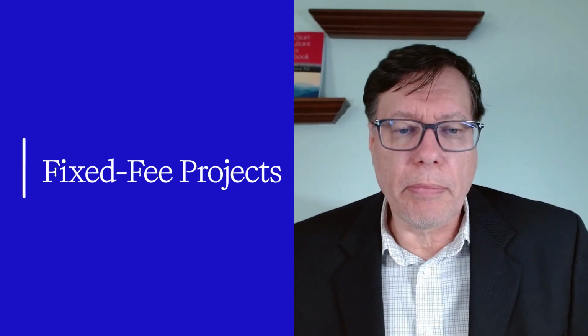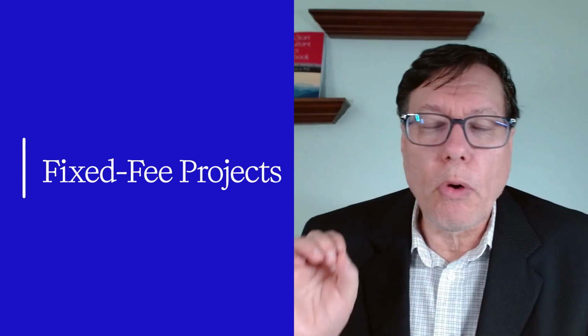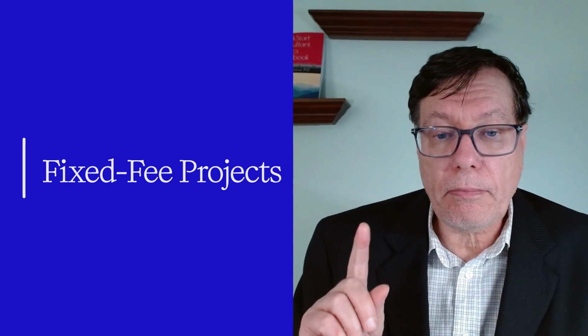Okay, so let's talk about the fixed price projects. It is really best if you have a well-defined scope. Right, so if you know what you're doing, you have your scope of work defined, you have some specifications of some sort, and you know the process for producing the outcome, then the fixed price deliverable type of contract is really useful in that situation. And the reason it's useful is because if you're more efficient than you think at accomplishing it, well, you pocket the same amount of money, whether you're really fast or really slow.